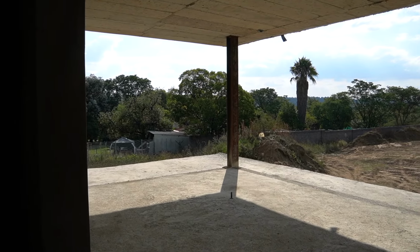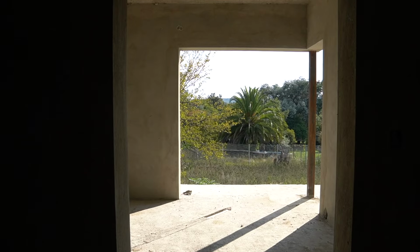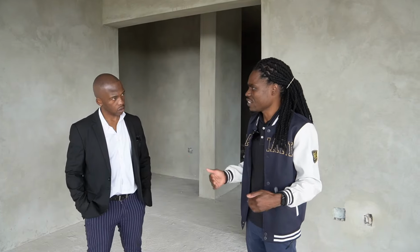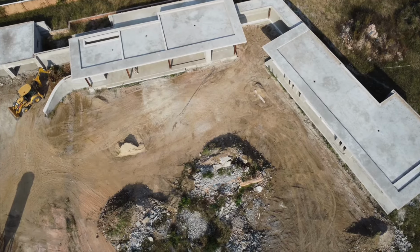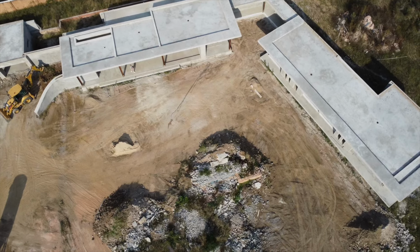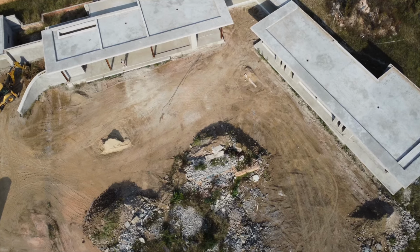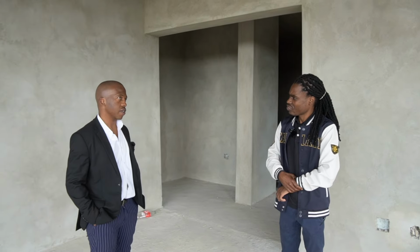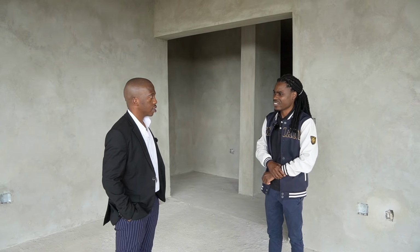I would say for a project like this, if you are concentrating on the structure, I think in 2 months you can do something in terms of finishing up the house and getting it ready to be moved into. But if you are also considering doing the outside estate landscape and all that, you might need three months. So in total, if someone was being very conservative, maybe 5-6 months to get it up to the point where it's ready to be used.